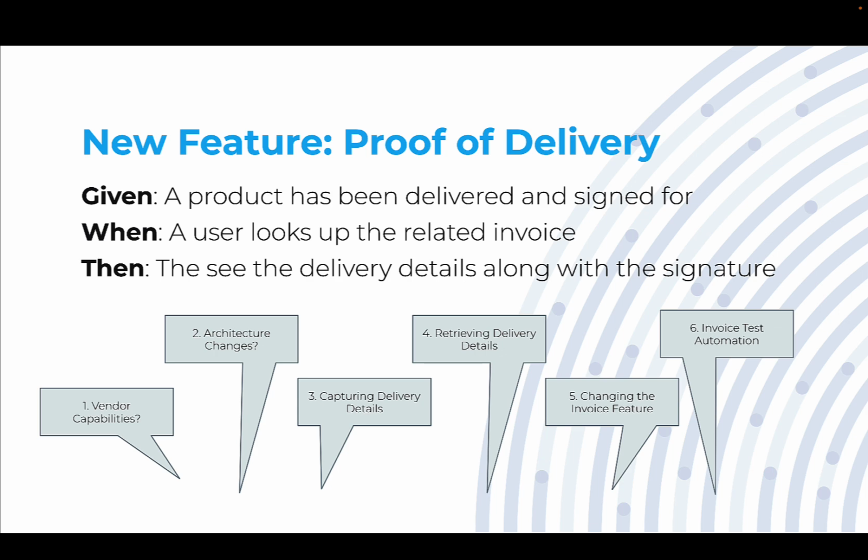This is really important because what we've really done here is we've defined a feature, and as a team, we've then broken it down into component parts. So we have these 6 different aspects that the Scrum Master or Project Manager is now going to go in and create some representations for, so we can later follow up on this and tackle this in the relative order if we have to do these 6 things.